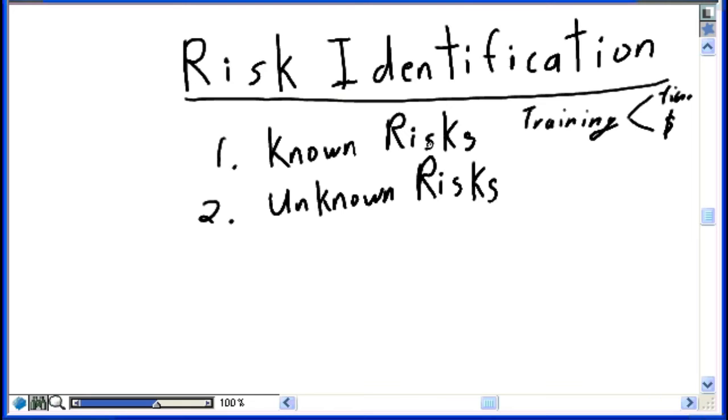Other known risks could be technology risk, server capacity. Going into the project, you believe you have sized the server with the appropriate capacity to satisfy the application requirements. But there's not a line of code written. There are no measures against how well the application will actually perform. You believe you have sized the server appropriately, but there's a risk that you may need to build a bigger server. There's a risk that you may need more CPU. There's a risk that you may need more memory. Therefore, you need to build in a contingency of specific dollars to build out the server as required once the application is in place. So training, server capacity are examples of known risks.